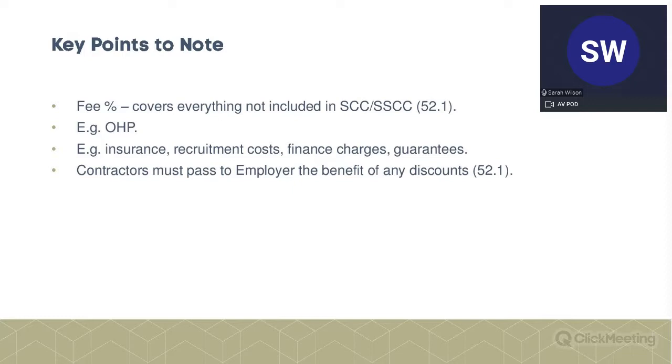So some key points to note: the fee percentage, as we've already said, covers everything that's not included in the schedule or the shorter schedule. So just be really careful about that. It covers overhead and profit. It also covers, as I've said, insurance. It covers recruitment costs, finance charges, parent company guarantee, all that kind of stuff.